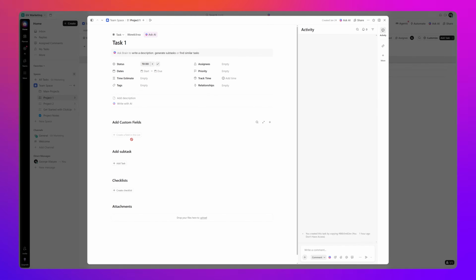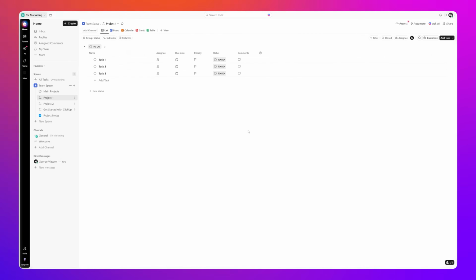Note, while there are also technically subtasks and checklists, this added layer of complexity isn't needed. Once a team member understands how to do their job, they'll complete subtasks and checklists automatically in their head. So the hierarchy goes: workspace, space, folder, list, task. If that sounds straightforward, that's because it is. Still, beginners often over-engineer their setup. I'll show you how to avoid that in the next section.